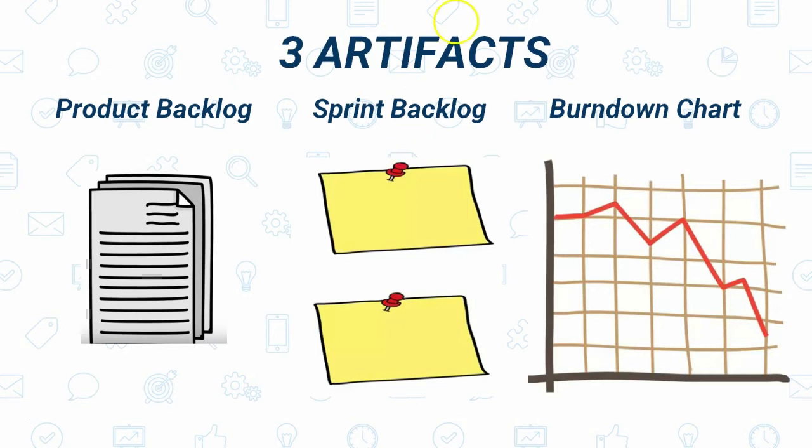So the ideal case is that it should start from here and it should end at the end. So that we started with some tasks which we have here, and at the end of the sprint it should reach 0, so that all the tasks which we are assigned are completed by the end of the sprint. So it is generally an inclined line from top to bottom.